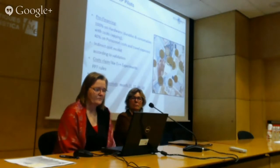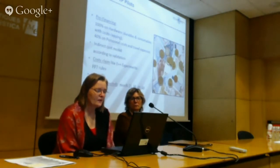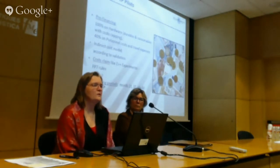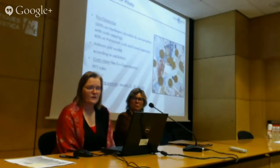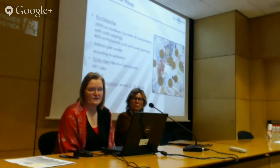The funding. We are going to give you pre-financing for the individual phases. So hardware, durable equipment, and consumables will be pre-funded at 100%, with a cost capping, and I would like to come to that point in a few seconds. And then we would like to have 40% of personnel costs and travel expenses pre-funded for the individual phases.